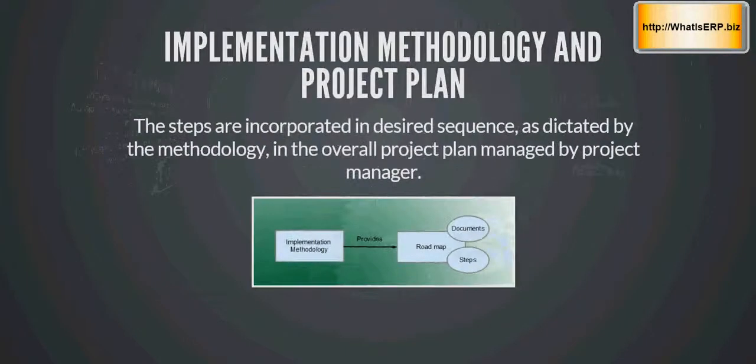So what is the relationship between methodology and the project plan? The steps of configuration recommended by the methodology will actually become part of the project plan, because when the project manager asks the functional consultants, give me the steps that you will be taking so that I can note them down in the project plan, the functional consultant will take a look at the methodology and reply back with a series of steps. So the steps in the methodology will become part of the project plan, but methodology is not the same thing